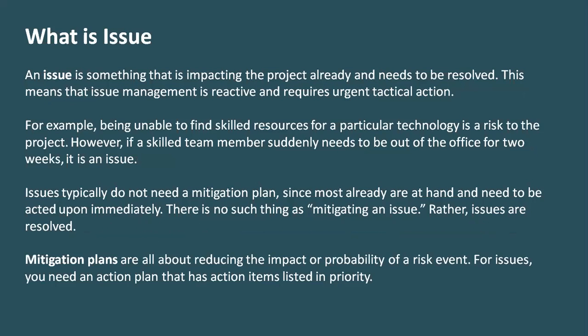Now, as we have learned what is risk, what is an issue? In our current example, if I'm running an IT project and 2, 3 of my resources are at high risk of dropping out of the project in the future, they might put down their paper in the future. That's a risk because that's in the future. What if now we have started running the project and these 3 resources have now put down the paper? Now my risk has just converted into an issue.